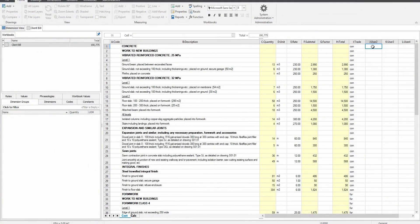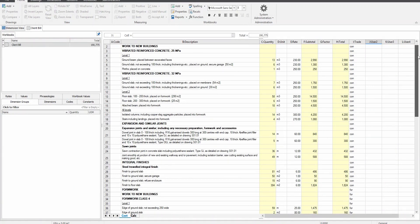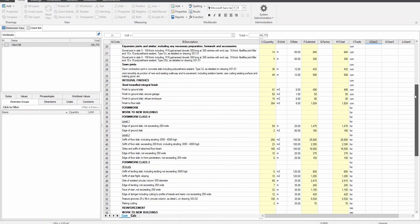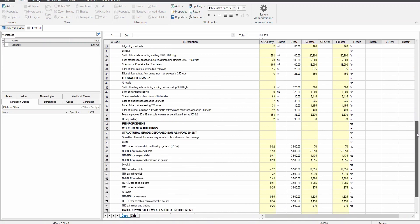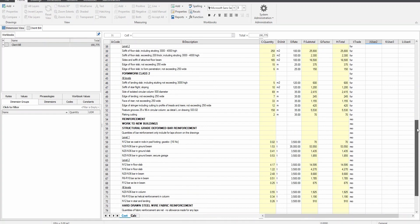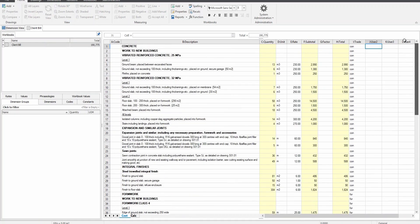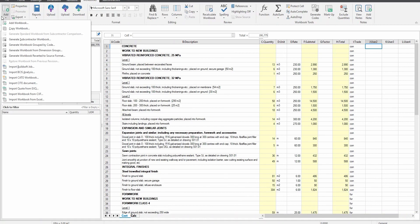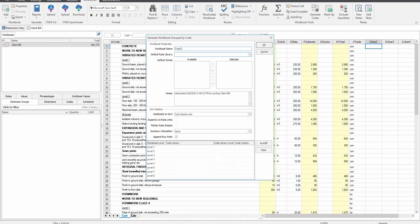Now let's create a subcontractor comparison workbook. In this building we've already imported the bill of quantities from the QS and the code library for a package breakdown which we will be using later. Under real life circumstances the BOQ would only have quantities but no prices. However, to save time here we have pre-entered all the estimate prices. The client bill is a single level workbook comprised of concrete, reinforcement, and formwork. For the purpose of subcontractor comparison we want to separate the three trades. As the codes have all been pre-entered and the code library already imported, we just need to select generate workbook grouped by code from the drop-down menu under the add button. We can call the new workbook trade sort, ensure the correct pre-imported code library in column I are selected and click OK.